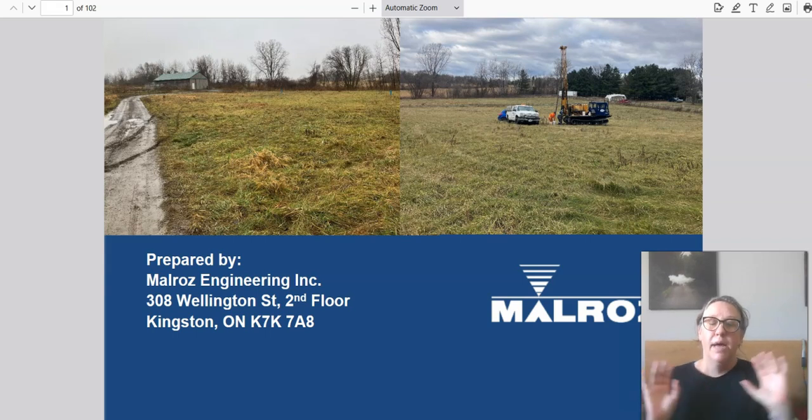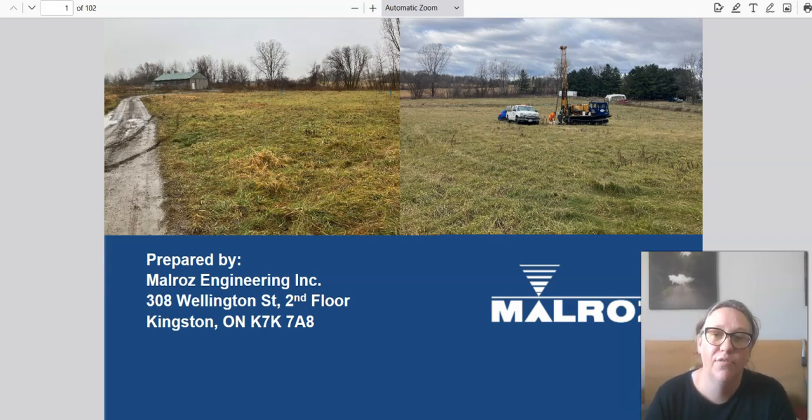But the thing is, if you go to a fence site and you do a site inspection and you don't know what's under the ground, and later on it turns out that there's hard rock or something like that, that you have to either do coring or alter your footings, or maybe there's a very high water table, so you have to bring in a pump to pump out your holes so you can pour your concrete. If you didn't know that when you went to the job site and when you bid the project, then you could probably get a change order for that and cover those costs.